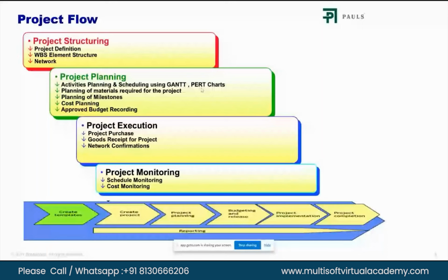Right. So do you mark certain WBSs as milestone relevant, or is there a special way to say something is a milestone? Yeah. While we create a WBS, we also create milestones. Certain WBSs would have specific milestones. Construction of second floor will have one milestone. Construction of fourth floor, sixth floor, likewise, based on your or the client's requirement, milestones can be created for specific WBSs, not at every stage, because every minute WBS cannot be a milestone.